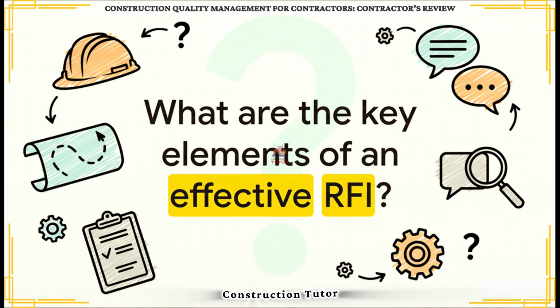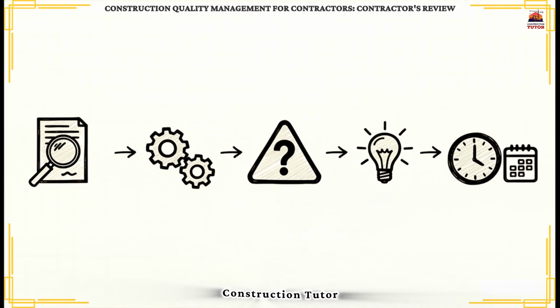And let's recap this one more time, just because it is so incredibly important. What makes an RFI truly effective? Exactly. It's that 5-step recipe we talked about. Review, coordinate, state the problem clearly, suggest a solution, and give them a time frame. An RFI like that just screams professionalism. It shows you're a partner trying to solve problems, not just point them out.